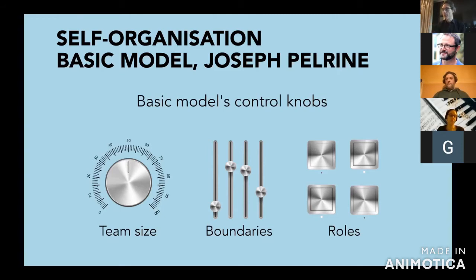It's not something that you can reverse quickly. So in order to avoid the problem, the best thing to do is to start observing the forces at work in the self-organizing system, and start to develop situational awareness. Take it easy first, look around, and try to understand that the system is a complex system and there is some self-organization going on. Second, when you start to think about which experiment, which control knobs you want to tweak and why, involve immediately the people that will be affected. If they are involved, it's more likely that the changes in disposition and propensity will not be negative. So involve them in the whole process: in selecting the experiment, in enacting the experiment, and in evaluating the outcome.